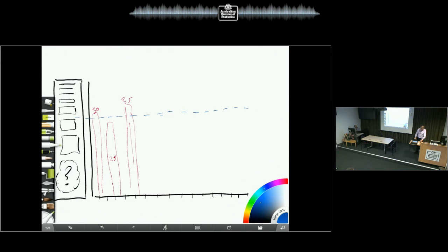What we want to do is this backlog here: the items at the top have the highest business value. And, sorry, close that down. As we progress down, we'll have a degradation over time. Say this was 1,000 points. Over time, every sprint, we're losing 35, 20, 25, and 30. And we can have a best case and a worst case. And this is called the cone of uncertainty.